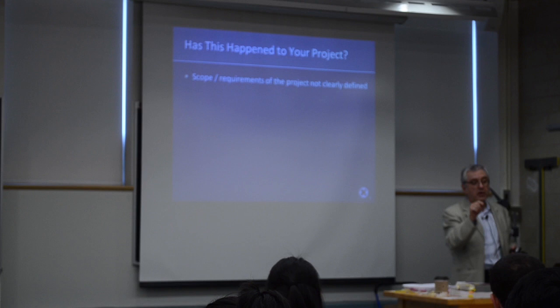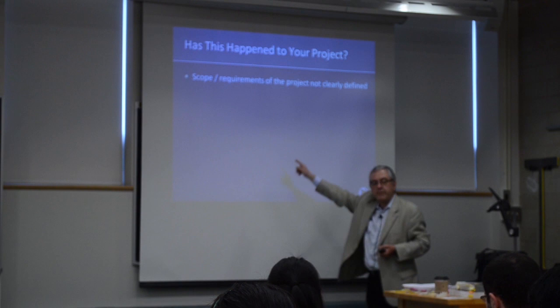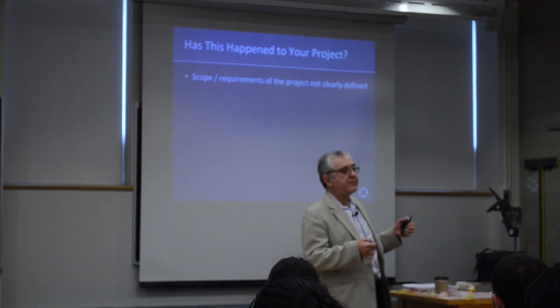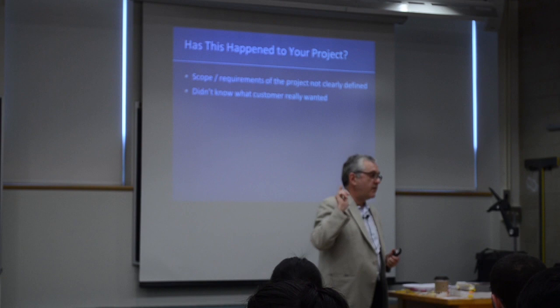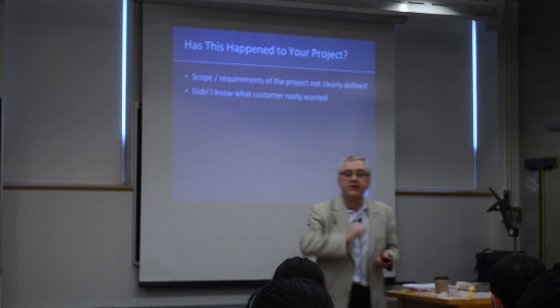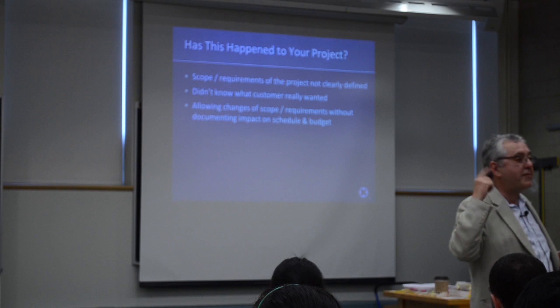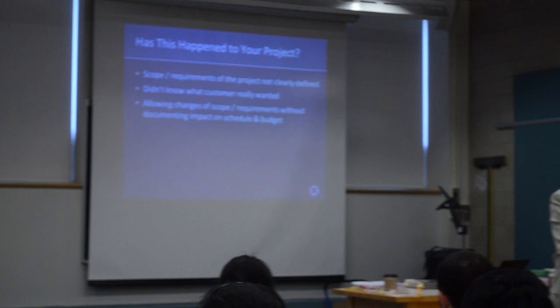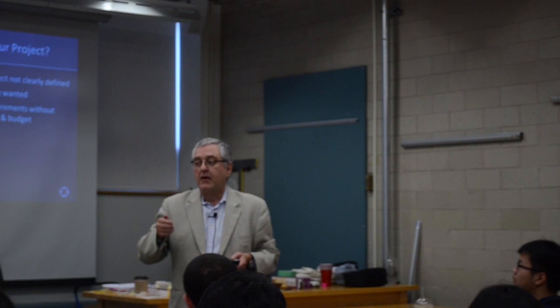Some common project management problems: the scope or requirements of the project were not clearly defined — this happens distressingly often. We didn't know what the customer actually wanted, or the customer didn't know what they wanted. Because of that, we allow scope to change without identifying the impact on cost and schedule. I'm going to illustrate this with a somewhat amusing video clip.